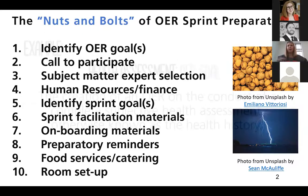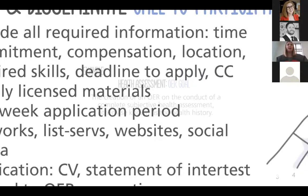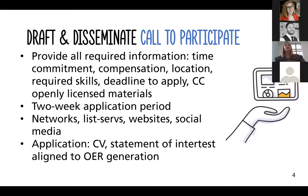First things first: before you jump into planning for a sprint, you need to identify the larger OER goal. In our case, one of the OER goals we worked on was the creation of a health assessment OER — specifically, the creation of an OER on the conduct of a complete subjective health assessment, otherwise known as health history. From there, the next step is to draft and disseminate a call to participate in the OER creation. On this document, you want to provide all required information: the time commitment, compensation if applicable, the location of the sprint, any required skill sets, a deadline to apply, and make very clear that participants will be agreeing to openly license materials.